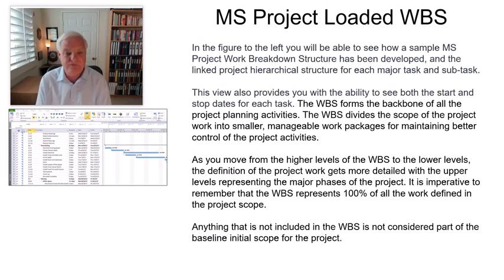Now, as you move from the higher levels of the WBS to the lower levels, the definition of the project gets more and more detailed, with the upper levels representing the major phases of the project. It is imperative to remember that the WBS represents 100% of all the work defined in the project scope.